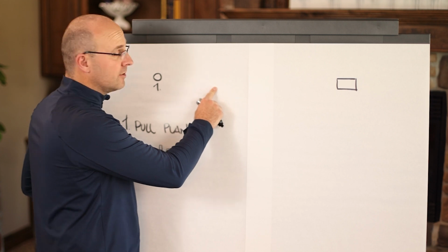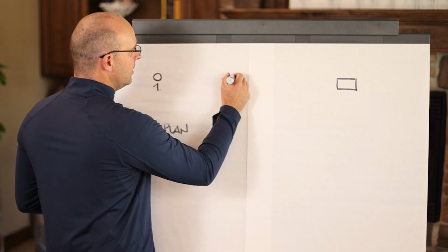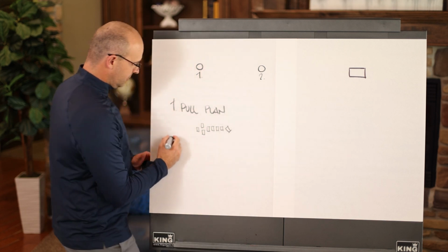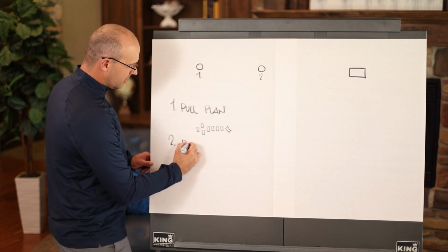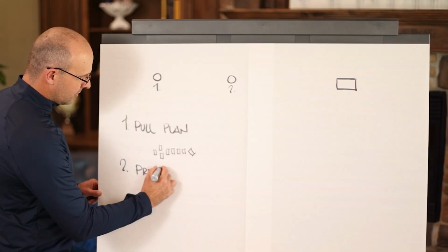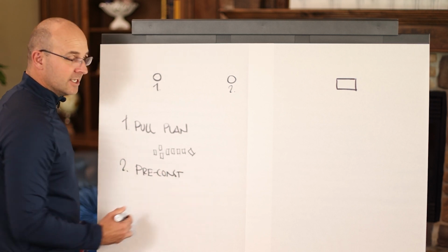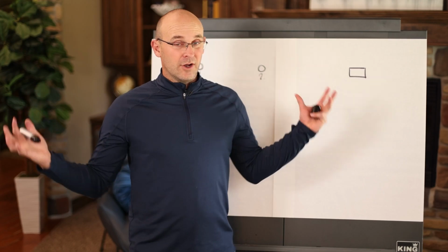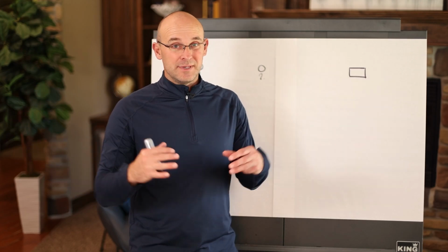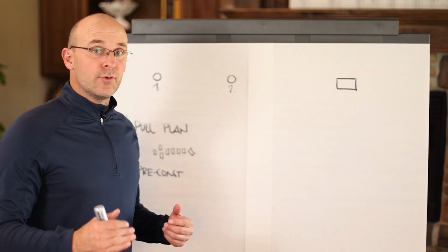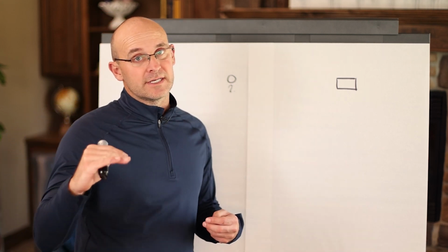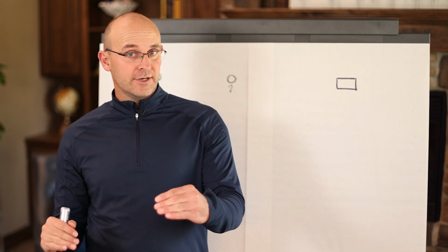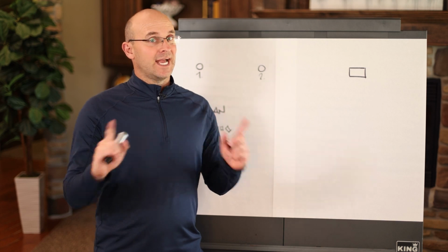So 3 weeks maximum, 2 weeks minimum before the activity starts, we should have number 2, I'm going to call it the pre-construction meeting. And so this pre-construction meeting is where we collect all of the submittals, the RFIs, the information. We get all of the stakeholders that need to be in that meeting together, and we go through the work and provide clear expectations for the crew leader so that he or she knows exactly what's expected.